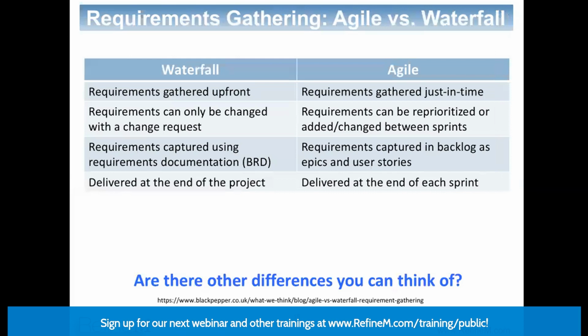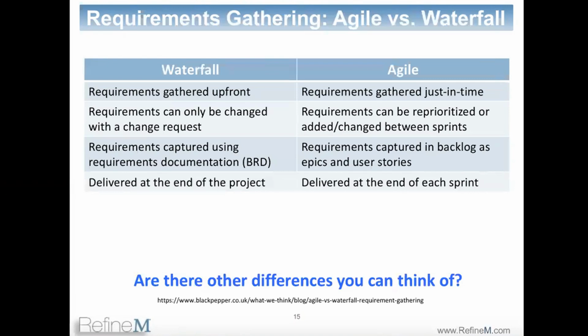In Waterfall, you baseline the scope, and based on that baseline, you create cost and schedule. You baseline scope, you baseline time, you baseline cost, and then any change that comes is evaluated with the reference frame of that baseline. That's project management work that every project manager will do in Waterfall projects. If anything changes in the scope, then the other baselines will change. It's not an easy thing. It's a painful thing to manage scope in Waterfall projects. In Agile, there is no such thing.